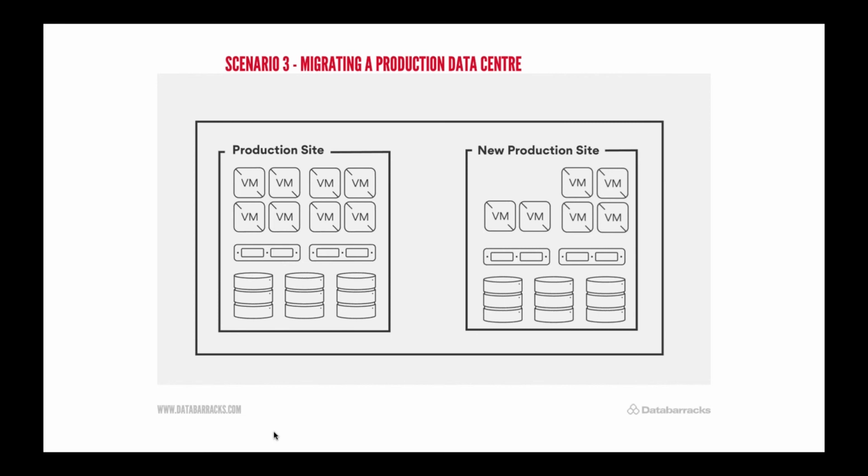Now, the downside of doing a phased migration like this is that you're running two sets of systems in parallel. There are two issues. One, obviously, is the cost implication, and secondly, these kinds of migrations are something that we were able to do because we didn't have a firm deadline. We talked at the start about how often there are hard deadlines for these migrations. For us, these were all choices. We weren't being forced out of the former production site, but it does mean that it takes significantly longer. So just something to be aware of.